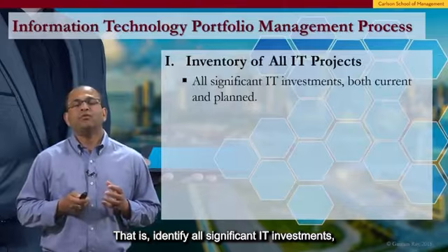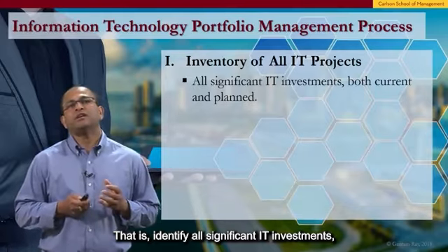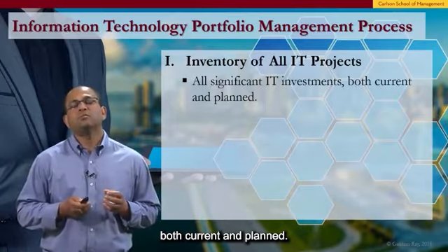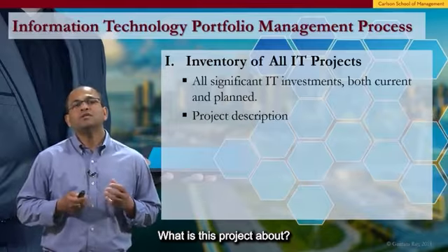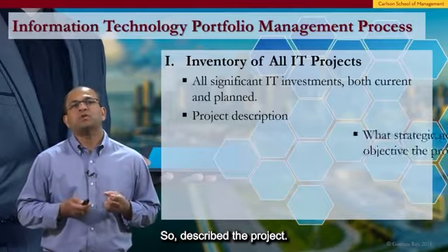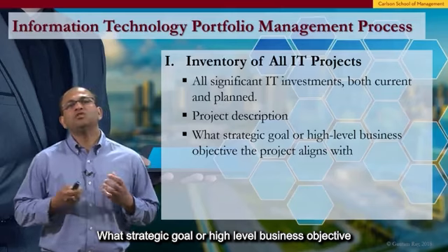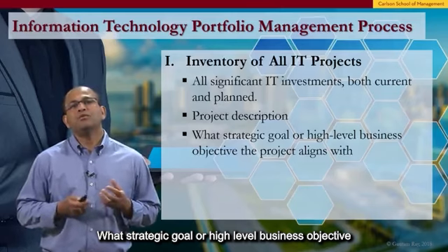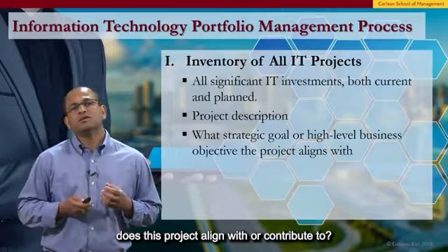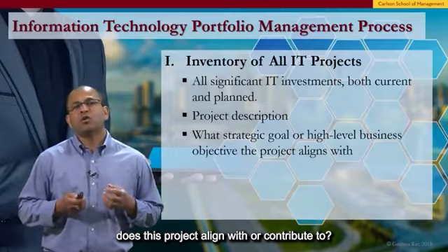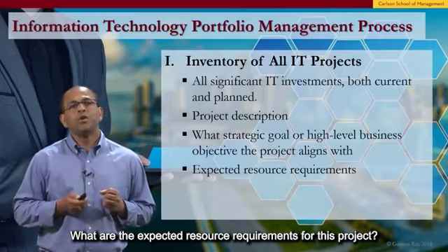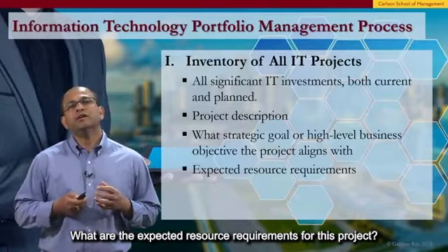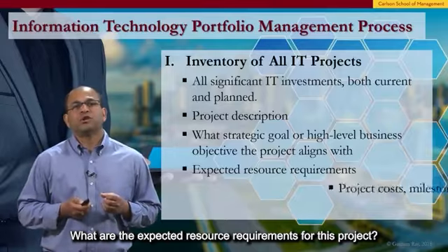That is, identify all significant IT investments, both current and planned. What is this project about? So describe the project. What strategic goal or high level business objective does this project align with or contribute to? What are the expected resource requirements for this project?